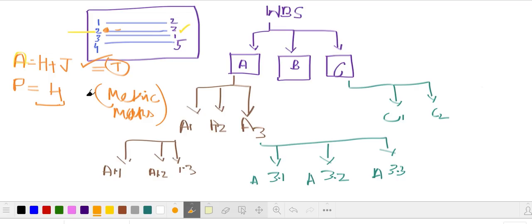For example, suppose I'm a manager and I give someone a task to paint a house, with 4 walls, and I ask that person, can you paint those 4 walls? He said yes. He went back into his history of the projects and saw that 4 walls took basically 5 days in total. So he gave the estimation of 5 days in analogous. But when I asked, okay, it's going to take 5 days, but what's the exact cost of that?